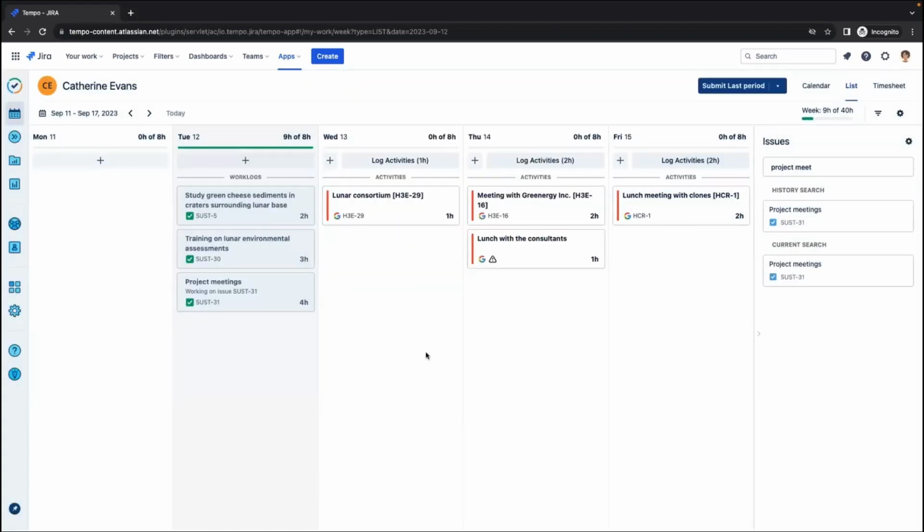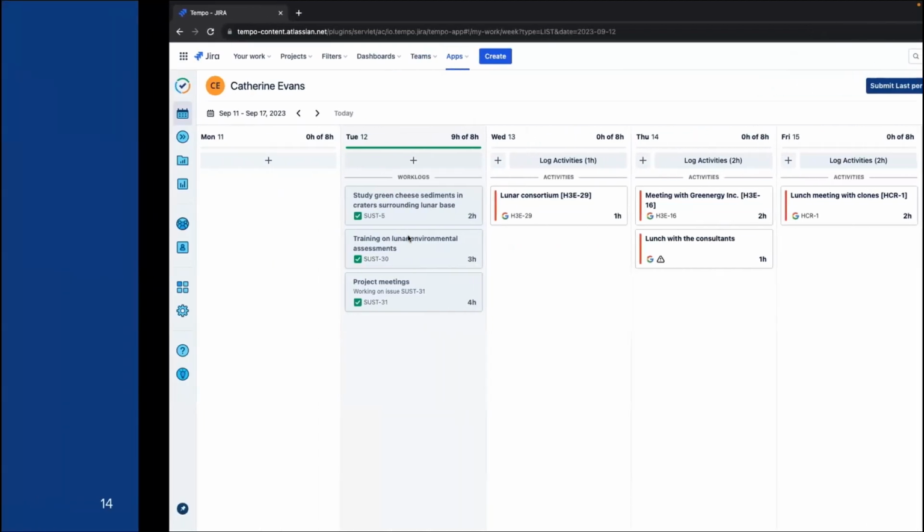But sometimes these meetings are billable, in which case you would let the billable hours equal the duration. So it's very important that non-billable hours are entered properly as not billable. Otherwise, they show up incorrectly in the billable column in the report later, and that can mess up your data.